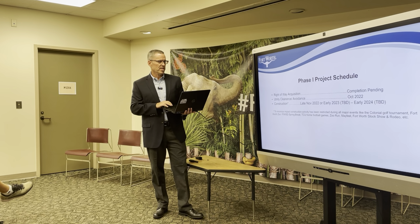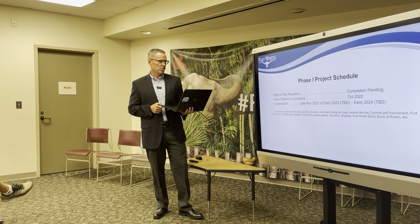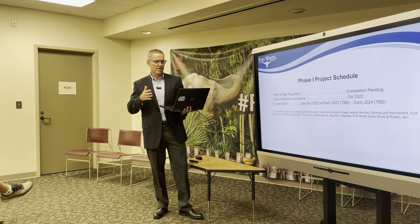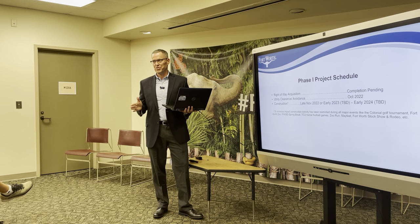Here we are to talk about the schedule. We have one easement remaining that is part of the deal with Trademark that I mentioned, one little piece for a bus stop that is almost done. Utilities are in the process of being cleared right now, with one spot left on that too. Construction start has not been finalized yet. We are still discussing that, but it will be somewhere towards the end of this year, and we're scheduled to be exactly a year in duration from whenever we start.